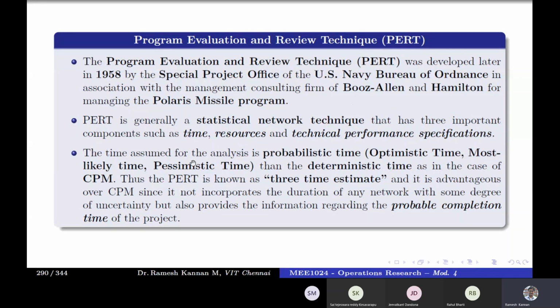It is also called multiple time estimate, and it looks very important. It is probabilistic time. If somebody asks you what's the difference between CPM and PERT: CPM is deterministic time, and it will give us the earliest completion. But PERT is a probabilistic time. It will give the probability of completion. That is one advantage of PERT. It will give us the probability of completion.